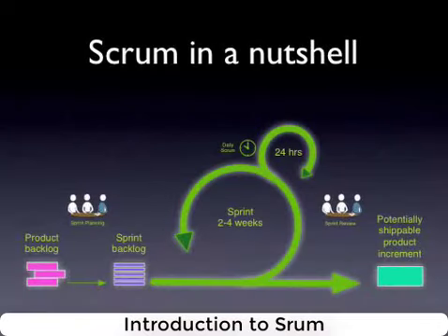So let's look at the process itself, and this is a diagram that will return to us throughout my presentation. So we start with a product backlog, and we are supposed to produce software in the end. So let's look at the steps. Now, the first step we discussed, which is the product backlog. Before the first sprint can start on a project, the product backlog has to be created and then prioritized, or in other words, sorted.